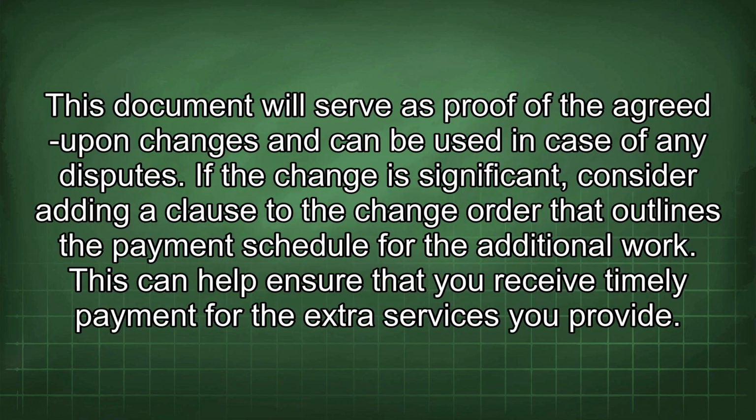This document will serve as proof of the agreed upon changes and can be used in case of any disputes. If the change is significant, consider adding a clause to the change order that outlines the payment schedule for the additional work. This can help ensure that you receive timely payment for the extra services you provide.